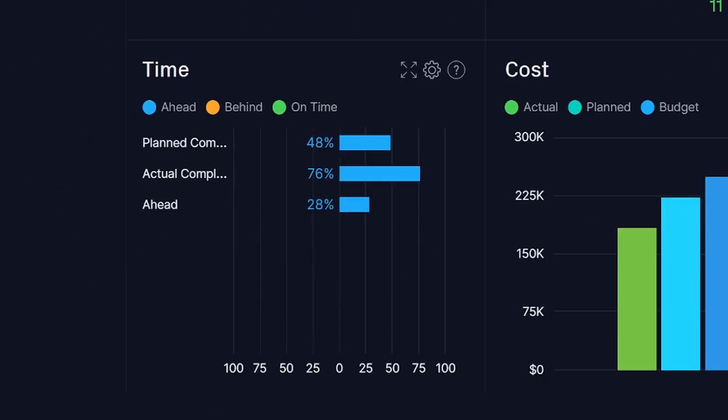The Time panel compares your baseline dates versus actual dates, which lets you see if your new tasks result in too much slippage.